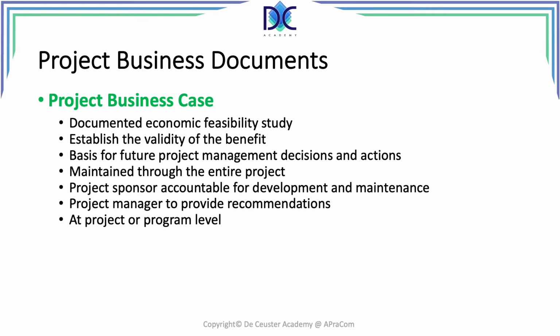It's the basis for future project management decisions and actions, and we will keep the business case during the entire project because it contains the main reasons, financial and risk reasons, why we want to have this project. The project sponsor is accountable for the development and the maintenance of the business case.